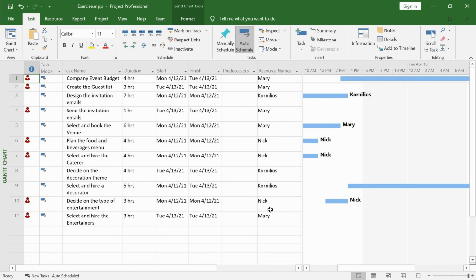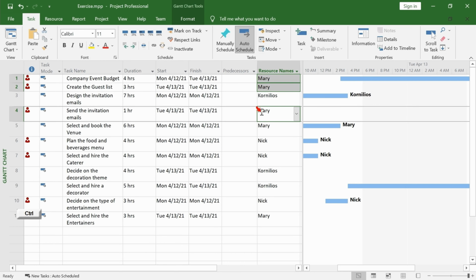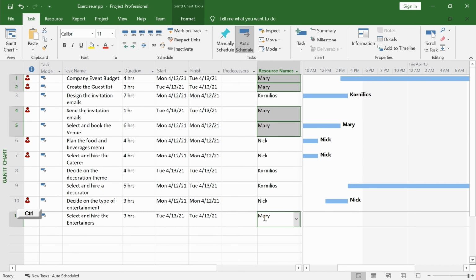The most common tool you will use in Microsoft Project when setting up your tasks will be linking. Let's see what the simplest way is to link tasks. Select all the tasks in the proper order. Click on the link button of the ribbon.